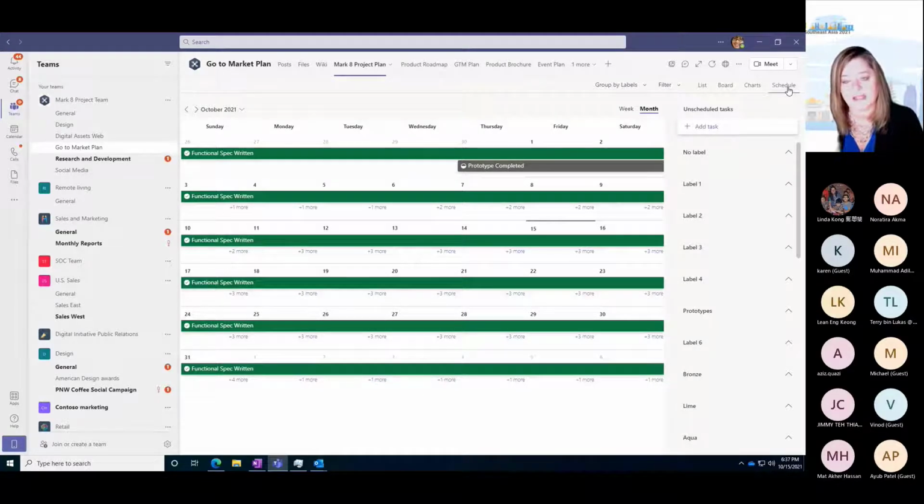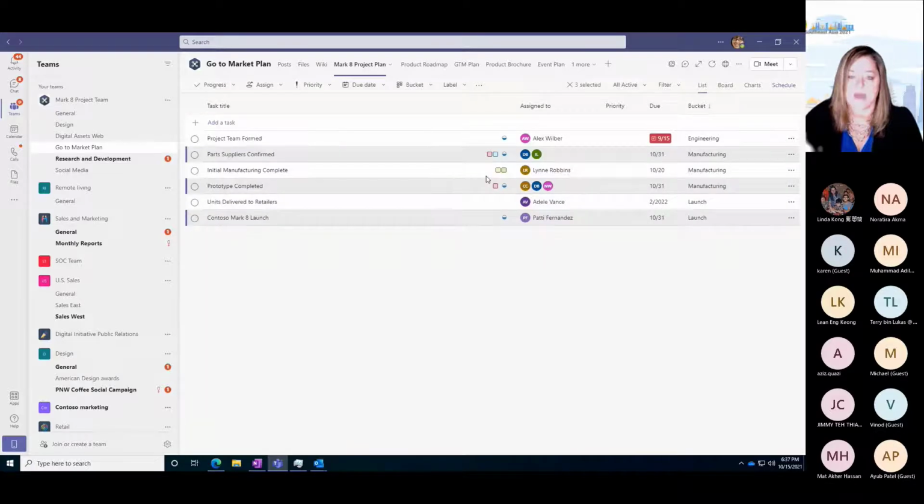The downfall of Planner is that everybody has the exact same rights, and there is no traceability as to what happened. So somebody could delete an item and you wouldn't know it. Somebody could change a due date and you wouldn't know it. So there's a level of trust when you're working in Planner that everybody is doing what they're supposed to do when they're supposed to do it, right? So it's not meant to be a very strict structure. It's meant to be a collaborative structure. Okay, so somebody could say, I've got too much and drag everything to Alex's bucket. He'd be stuck with it all.